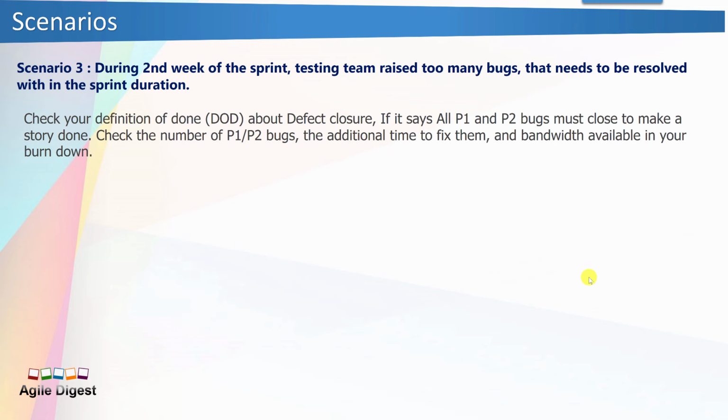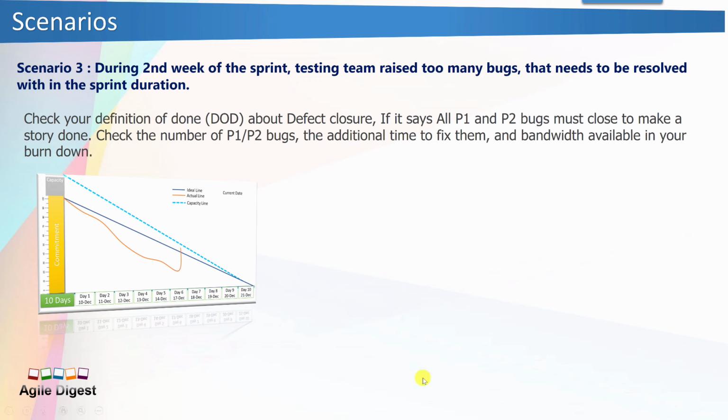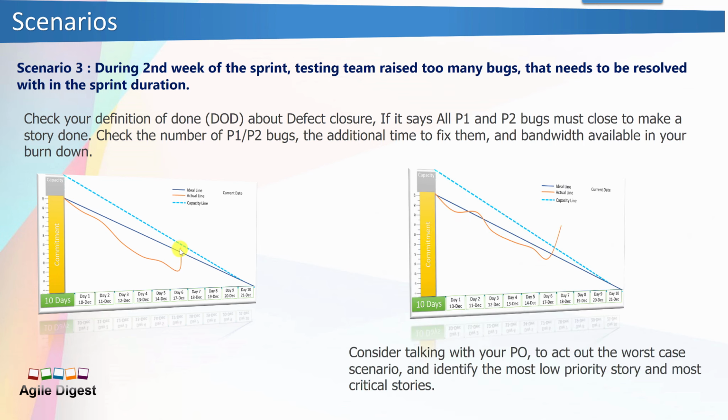And if it requires that I need to close all the bugs that come in, you will see a spike within your sprint. So in your Burndown, you are creating those sprint defects. Each sprint defect needs some task hours, and those task hours increase your actual Burndown toward high, because as of now it had some 8 or 30 hours of work remaining, and after these bugs it becomes 40 hours something here. So there are other cases also.